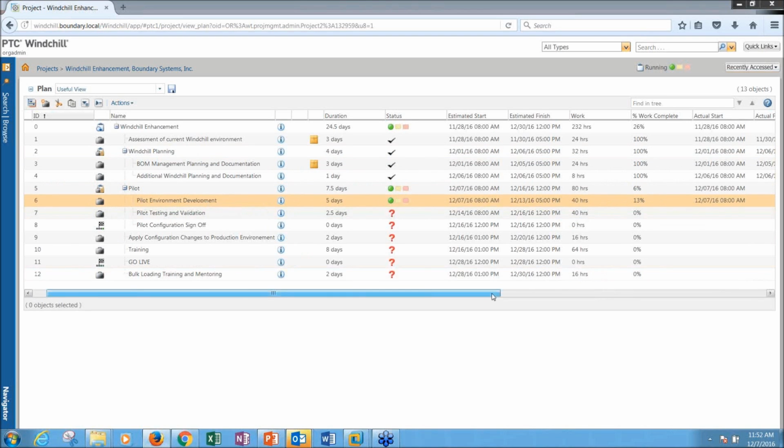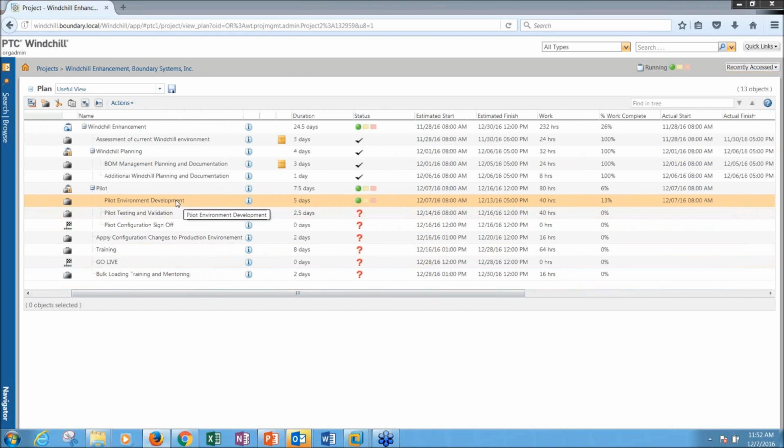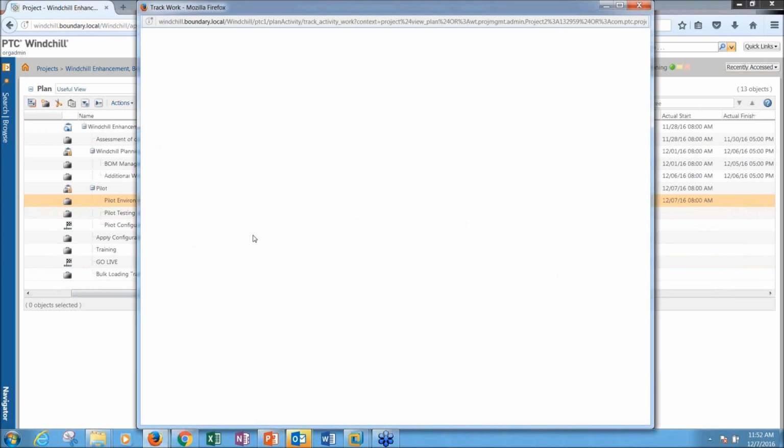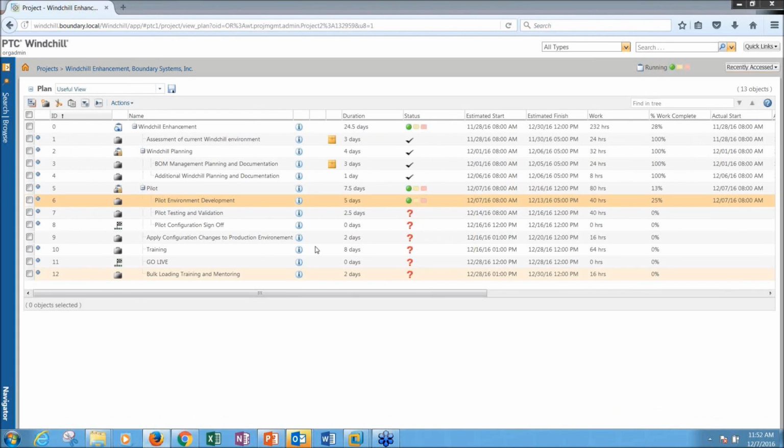Maybe I got an update from D'Angelo, if he is doing that development, so I can go in and say I want to track the work, and say, okay, he put in another 5 hours of work here, so I'm going to bump that up to 10. And now we're 25% done with that particular task. So I can specify updates to the amount of work we've completed on these.